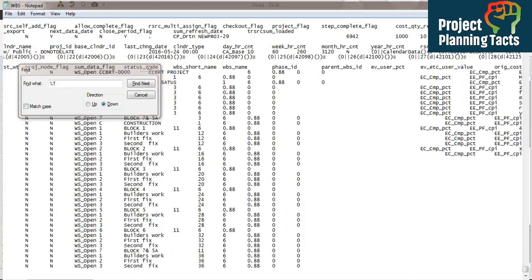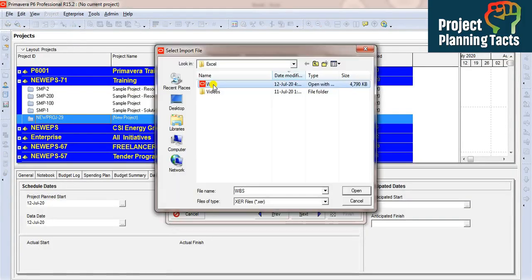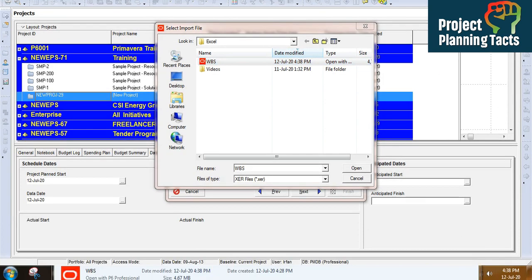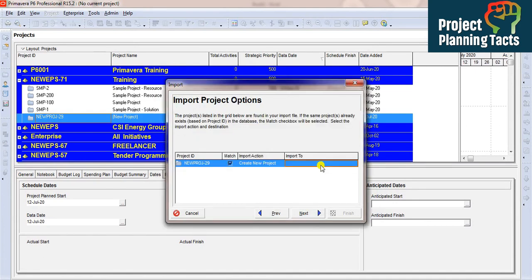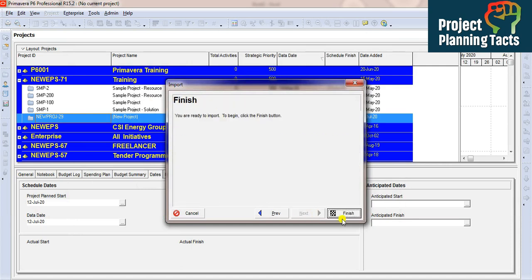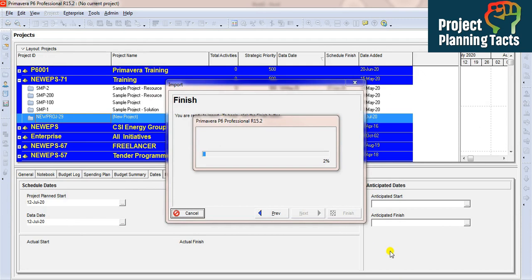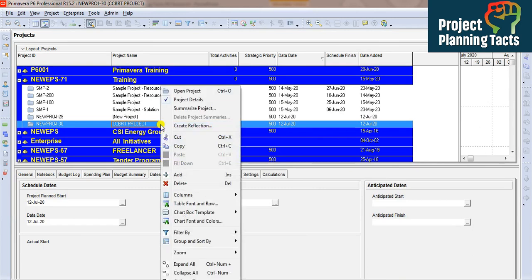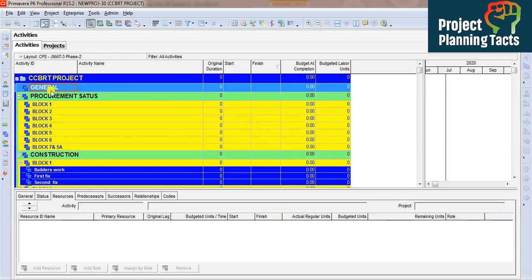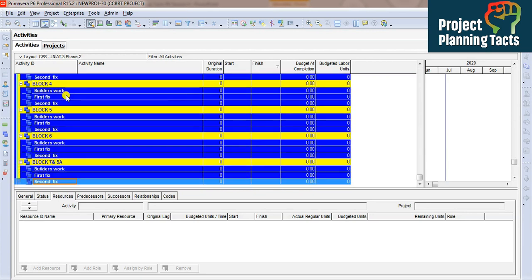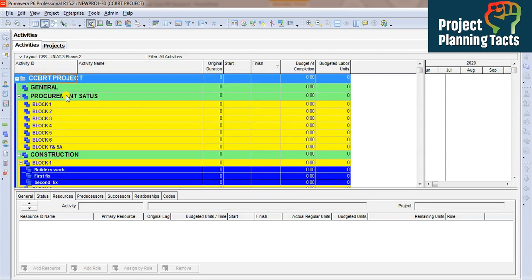I'll save the Notepad file, close it, then go to File > Import in Primavera. I select my XCR file — which now shows 438 bytes — click Next, select my EPS, click Next, Next, and Finish. It is successfully imported. I close the window, open my project, and there I have all the WBS entries created — and it took me only a few minutes.